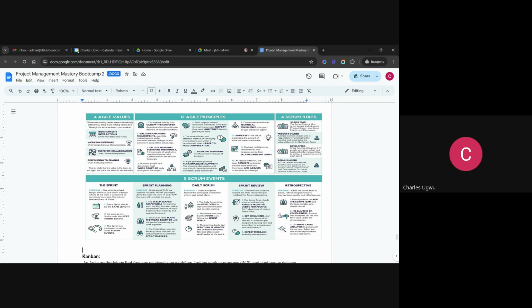To get that velocity, the scrum master will understand their capacity in the first sprint and in the second sprint. You allow the team to work through like three different sprints. So you capture their capacity in the different sprints and then get the average. That will become what you'll be preaching to the team, to work within that average so that they will be on a pace. That pace will help them keep on delivering constant value. That's what we mean by sustainable development.